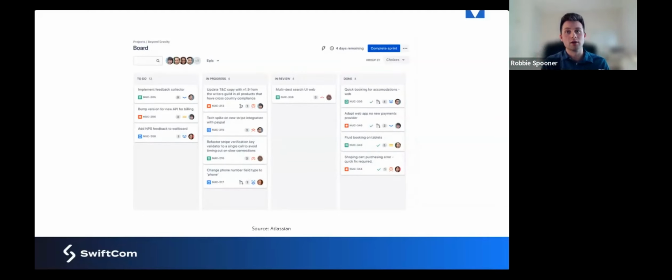And another thing to note with Scrum is the definition of done is something that is decided as a team, but instead of just being aesthetically finished from a code perspective or design perspective, it will often include a level of testing, security. There's a rigor behind something actually making it to the done column that you can view as kind of quality assurance.